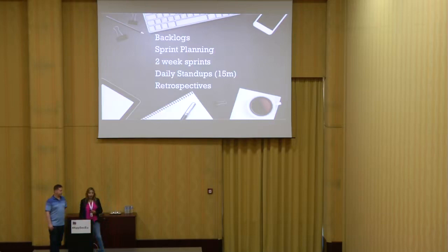We pretty much have it Monday morning. And we have 2-week sprints. So the sprint planning meeting, we look at our backlog and say, okay, which stories are going into the sprint? Right, so we put the stories in, put that into the sprint. We have daily stand-ups, and we've gotten really good at our stand-ups. I mean, we're down to like 17 minutes. At 6 of us, we're down to like 15 to 17 minutes.